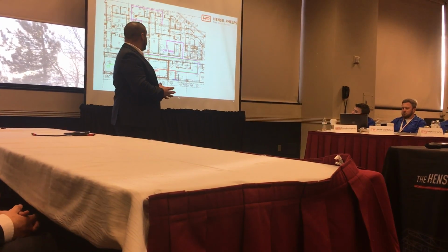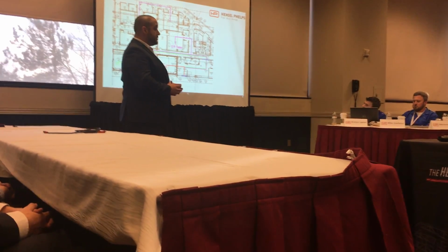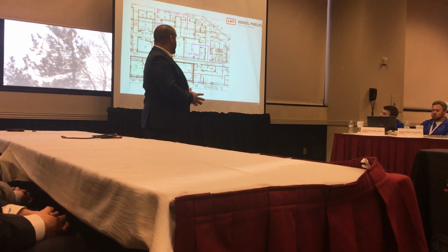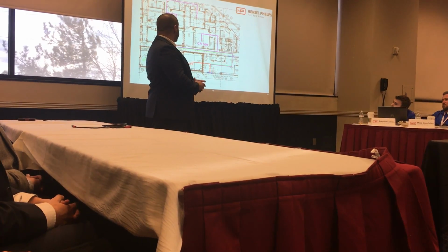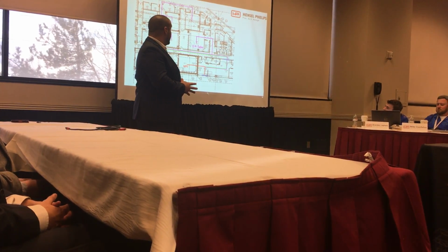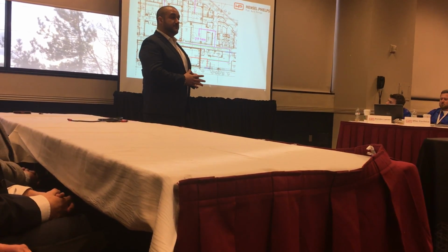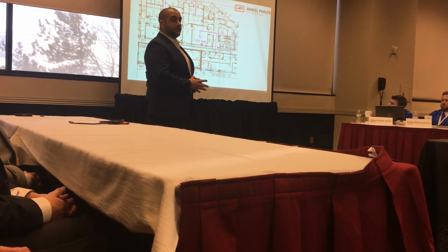And we have decided to keep one of the partition walls, the lead partition wall, out for the time being to get the machine in, and we'll have to remobilize the crew to get that installed. With the CT scan machine, we decided to remove a second wall, or leave out a second wall, leading into the corridor, which is roughly 17 feet wide, which will accommodate the width of the CT machine and all equipment going to the OR.